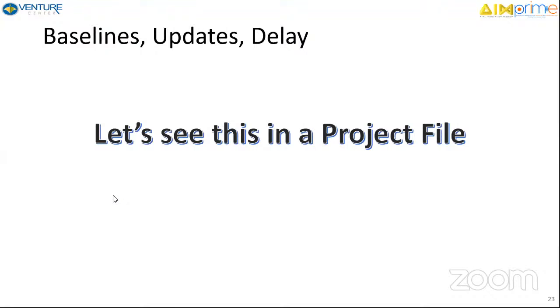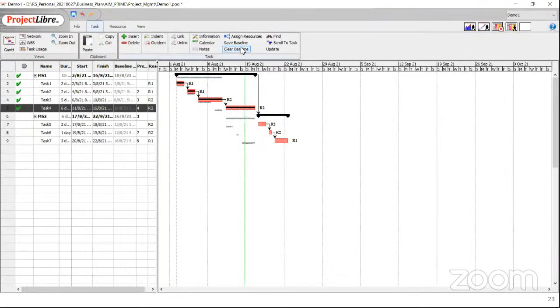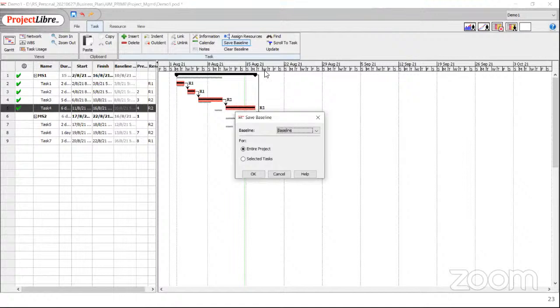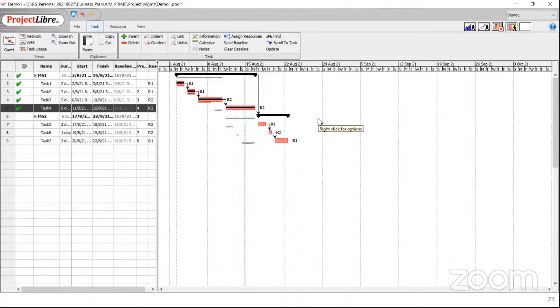Okay. A couple of questions. One is, if the baseline is selected, then is it so that we cannot change the plan? You can have a second baseline. Okay. And you can have a third baseline. So here, you can have up to 10 baselines. PMIS creators, in their wisdom, almost everybody provides 10 baselines. So they expect that beyond 10, you better rethink your life. That is their expectation, I think.